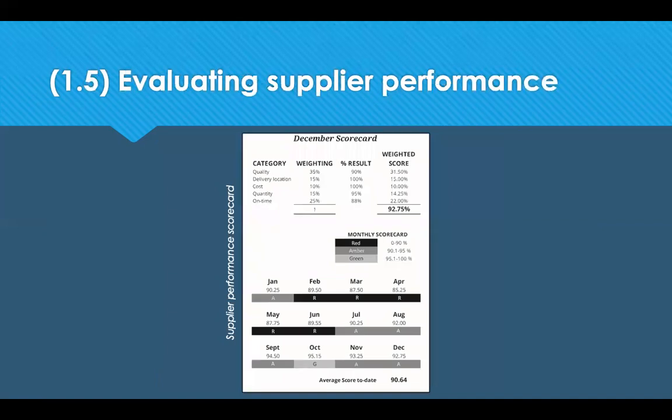And the final slide in this revision session is to look at evaluating suppliers' performance. So it's a measure to ensure that the supplier has delivered what they promised. And it captures these 5 rights. You've got things like quality, cost, time, quantity, making sure that the supplier has delivered upon what they agreed. The supplier's achievement against them can be monitored so that we provide feedback, and it's important that KPIs are measurable, SMART, etc., and that we can monitor them.